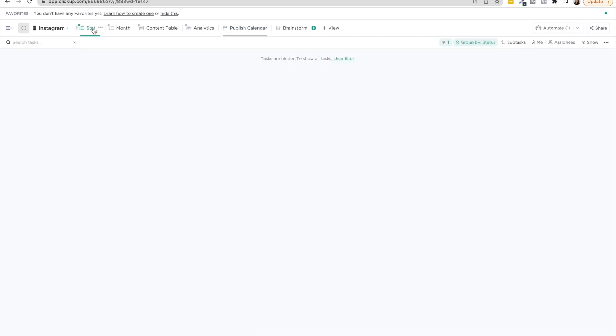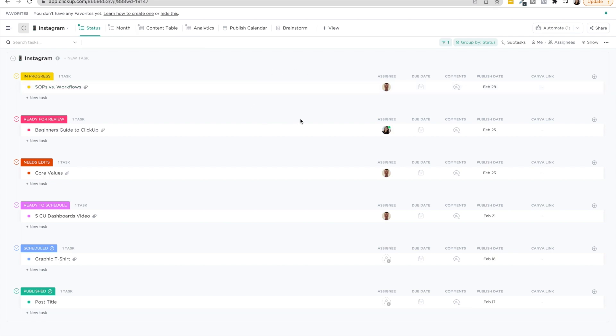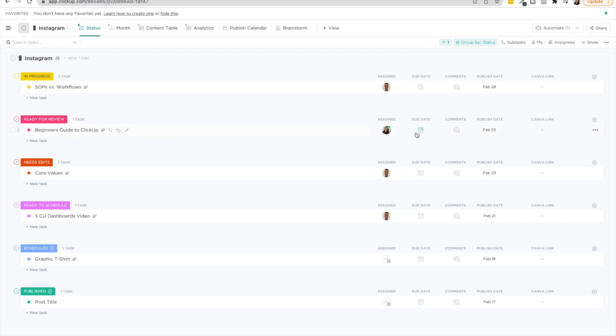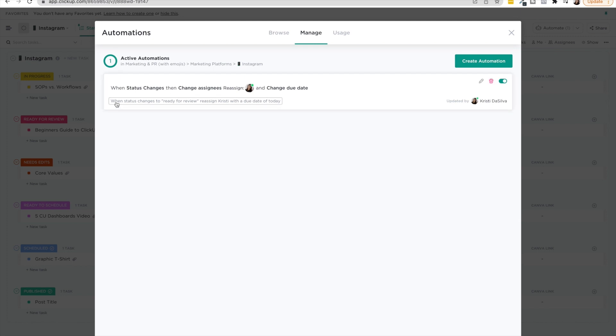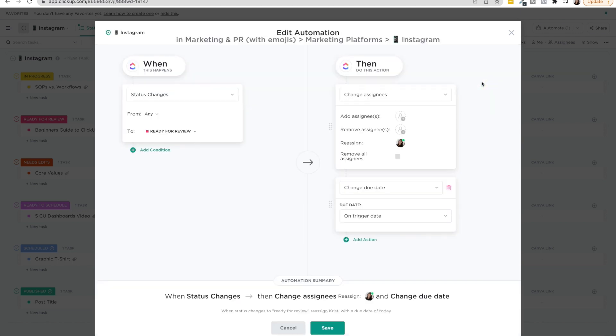So another thing in this workflow is you want to try especially with ClickUp there's so many things you can do to automate as much as possible. So we don't just say okay when it goes to ready for review say Jeff was in charge of creating this well now I'm going to reassign it to Christy and tell her that I need it reviewed by tomorrow. Instead we have ClickUp doing that work for us so nothing is slipping through the cracks. So one example of this automation is that when the status changes to ready for review it's going to reassign me with a due date of today. So if I click and edit you'll see what this automation looks like on the inside when the status changes from any to ready for review, reassign Christy and change the due date on trigger date.